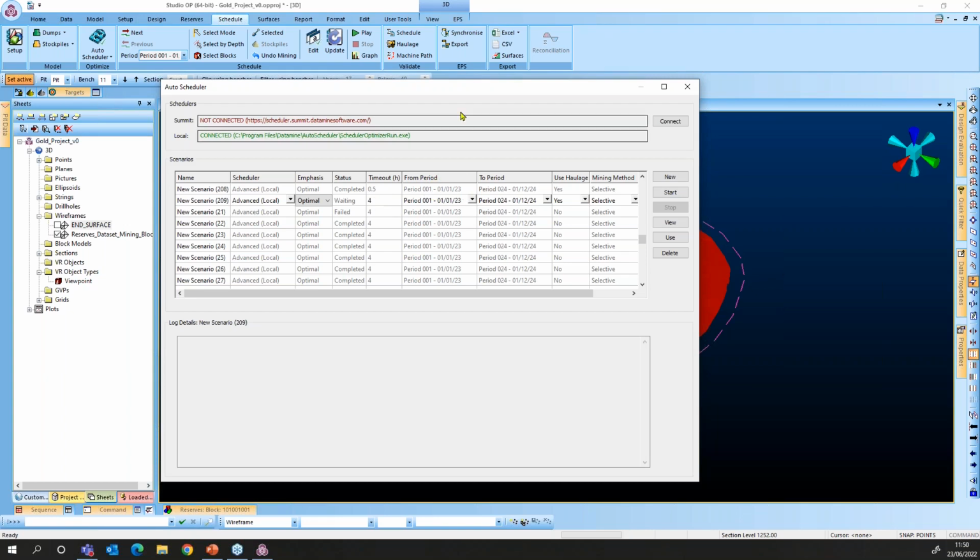As you have seen, you can do a manual schedule if you want, and then you can run AutoScheduler. Maybe you have the interest of doing a manual schedule just for the first month, and then moving on to the other periods. So you can, for example, make it manual for the first period and then tell the scheduler to run AutoScheduler and respect all of its settings and the use of these resources just starting on period 2.